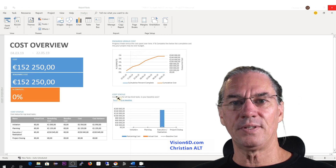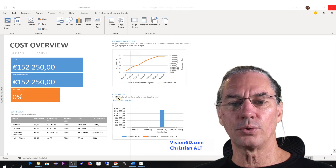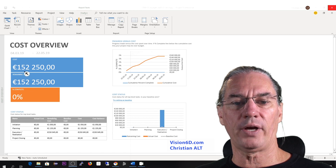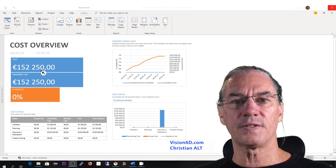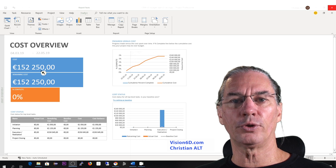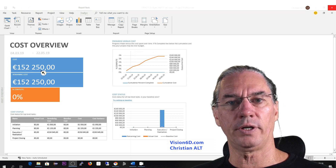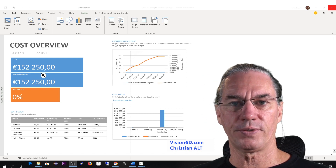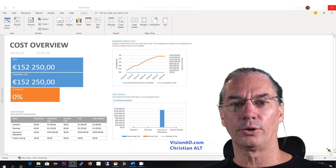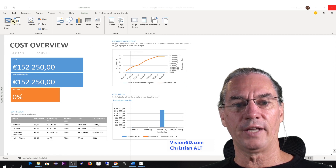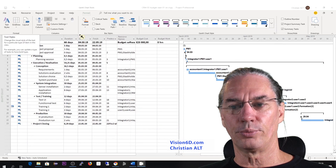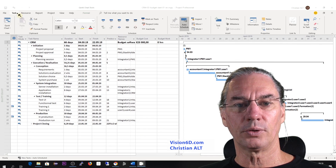So 152,000 minus 23,000 makes 129,000 — this is the cost of the internal resources that will work on the project. This sets the question: shall we say that the project is 23,000 or 152,000 euros? I have seen different ways to solve this. Some companies bring the full money amount of 152,000, and others prefer to have that separation between the real costs, which are investment, and the working hours.